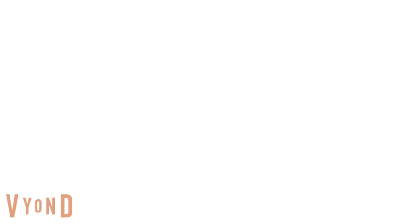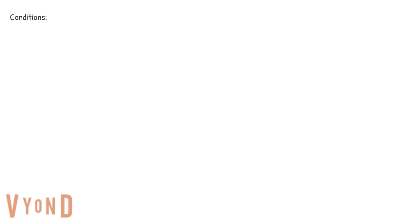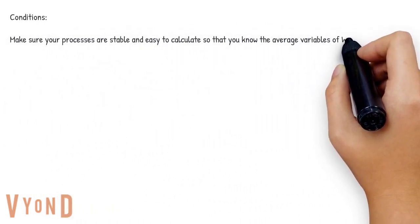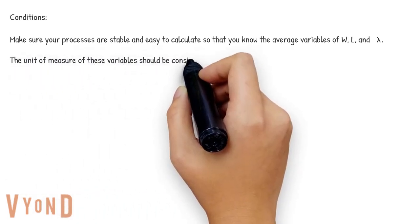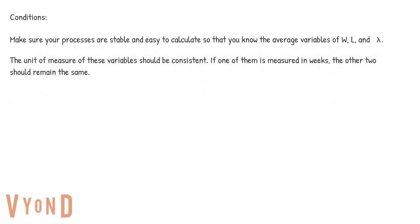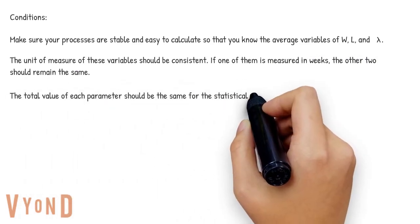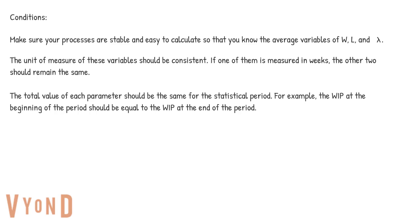Those are perfect examples. We may run into some practical problems when applying Little's Law formula. Here are the conditions you may need to meet to make your process or workflow predictable and applicable to Little's Law formula. Make sure your processes are stable and easy to calculate so that you know the average variables of W, L, and lambda. The unit of measure of these variables should be consistent. If one of them is measured in weeks, the other two should remain the same. The total value of each parameter should be the same for the statistical period. For example, the WIP at the beginning of the period should be equal to the WIP at the end of the period.